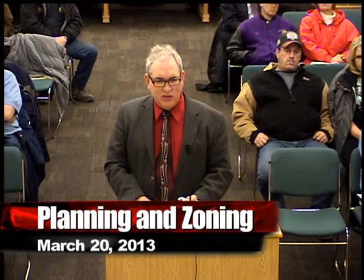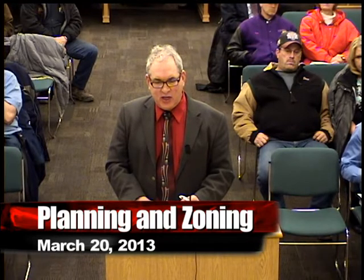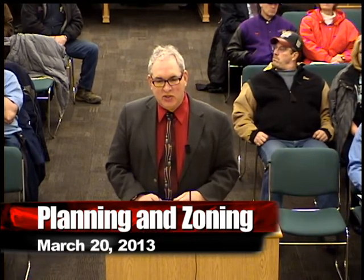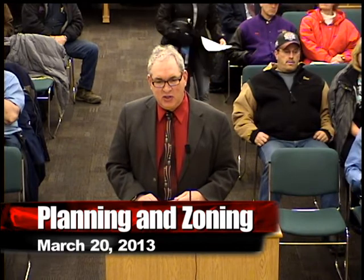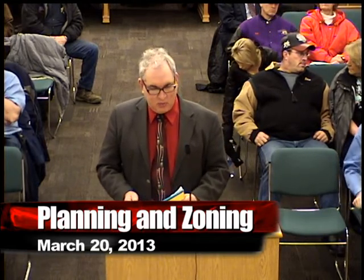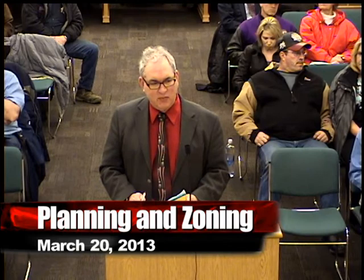I will add two things to this. We did send this out for staff review, and I know that the applicant had acted on widening the size of the cul-de-sac in order to accommodate comments that were received from the city fire department. This was also sent to MDU, and they had asked for some lighting easements, and they also accommodated those comments by including those easements. I sent the revised preliminary plat to both parties, and they said that they felt that met their comments. So if you have any questions, I'm here to answer any other questions you may have pertaining to the staff report.